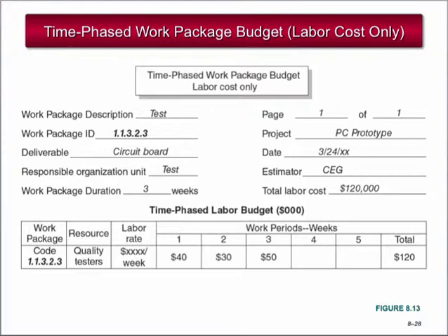A time-phased budget for each work package is lifted from the work breakdown structure and placed in the schedule as they are expected to occur. The result of this budget allocation is the project cost baseline, also known as planned value or PV. Planned value is used to determine costs and schedule variance from the original plan as the project progresses.